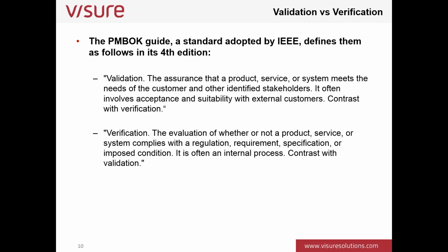Once again, in a different body of knowledge, the PMBOK, which is the Project Management Body of Knowledge, there are also a couple of definitions for those two concepts, validation and verification. Validation is the assurance that the product, service, or system meets the needs of the customer and other identified stakeholders. That's the important part. It often involves acceptance and suitability with external customers.